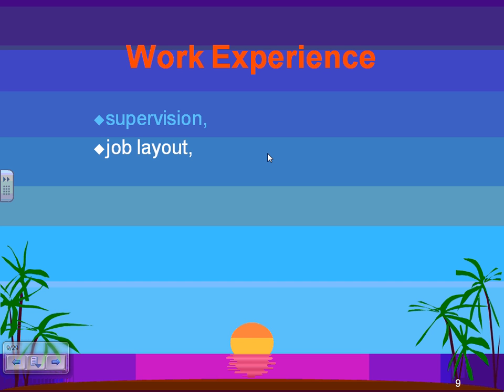Ashley and her brother are working on a job. If you walk in and there are 6 electricians and the job is not laid out, guess what? You're holding 6 electricians. They're sitting there waiting, not doing any work, until the job is laid out. Who's going to be laying it out? How fast? Is the job laid out right? All of these will affect it.